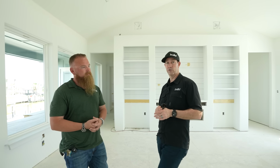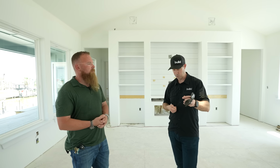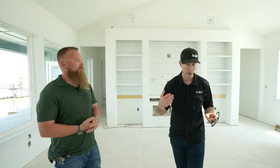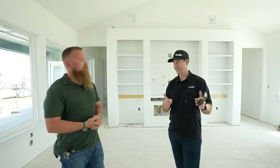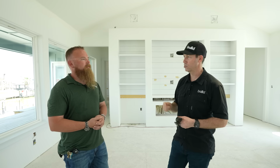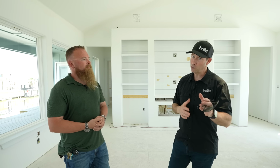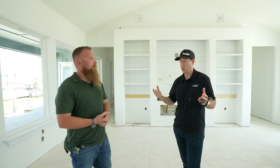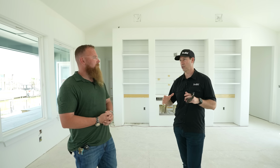And then lastly, if you've got a foam crew that you're not familiar with and you want to double check their depth, hand them a poker, basically a coat hanger with a piece of tape on it. If you know that you need 9 inches of open cell at your roof deck, and that's what you paid for, hand them a poker that has 9 inches taped, and say, if I use this poker after you're done and I find anything that's not 9 inches, I'm gonna give you this crisp $100 bill for each guy in your crew. Then they're incentivized, not the boss, but the guy who's actually spraying. I've given that tip to a few people over the years, including some homeowners that were self-contracting, and it works like a charm. Those guys would really make sure that you get your full 9 inches.